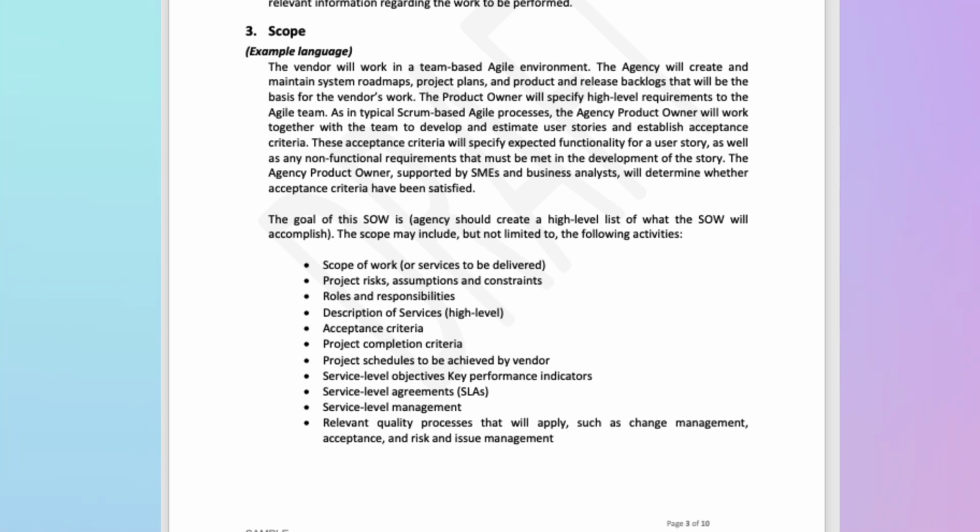So this SOW, as I told earlier, is a legal document. Based upon this document only, budget and timelines are finalized. So we have to be very careful in creating the scope of the project. If you don't include anything in the scope column, then the vendor assumes that it is out of scope. If they assume that it is out of scope, then they will not deliver it and we are going to have an issue. So as a BA, you have to make sure that you document as much as possible whatever you feel is the scope of work, and you make sure that everybody is aware of the scope of this particular project.